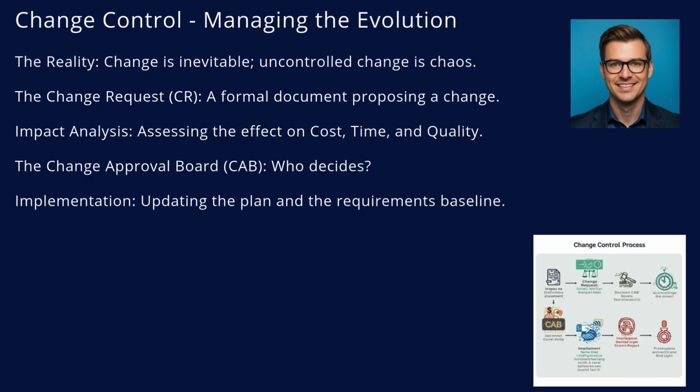If approved, you don't just build it. You update the project plan, you update the requirements baseline, and you communicate the change to everyone. This keeps the project aligned.